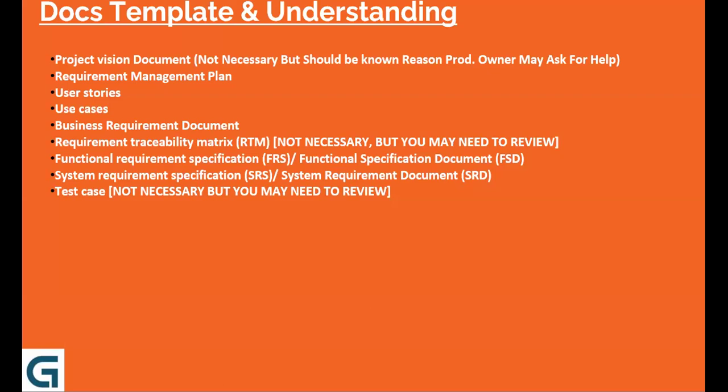See, as a business analyst, at the beginning of the project, the entire work should be finished, and later on I just have to be available in a sprint. Test cases are not done in the beginning because they are done towards the end of development. But project vision document, definitely at the beginning.